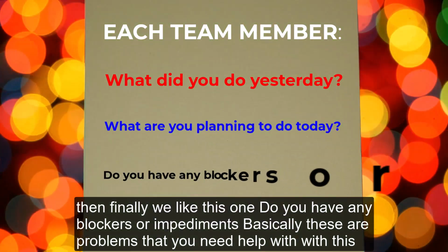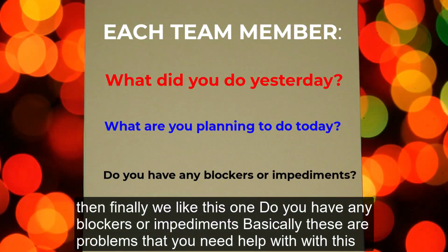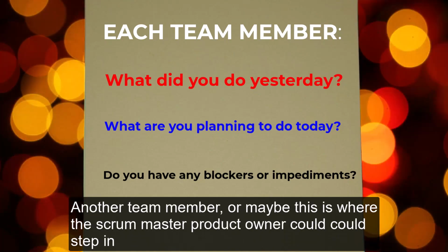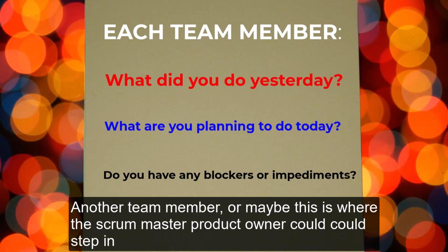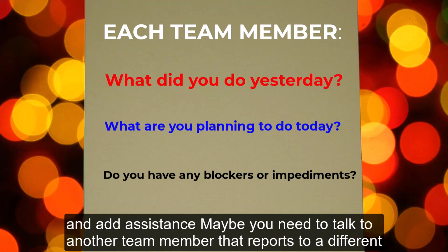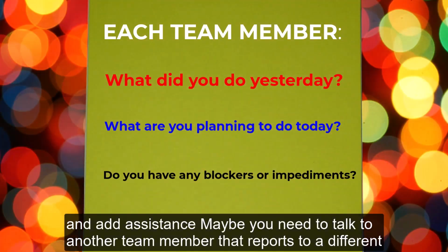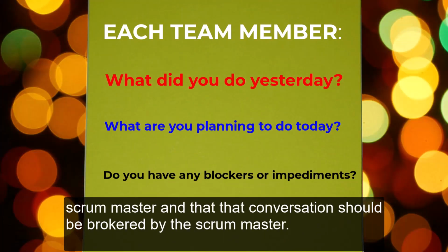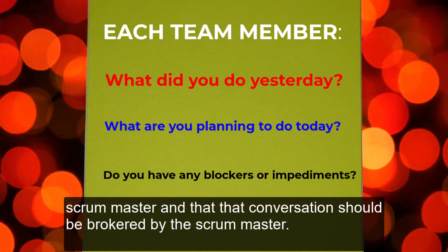Do you have any blockers or impediments? Basically, these are problems that you need help with. This could be help from another team member, or maybe this is where the Scrum Master or product owner could step in and add assistance. Maybe you need to talk to another team member that reports to a different Scrum Master, and that conversation should be brokered by the Scrum Master.